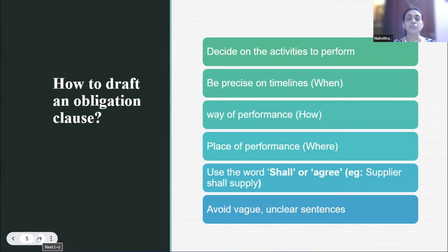In case it is period specific, maybe the person can supply the goods any time between 1st of May to 7th of May. In those 7 days, any point in time, he can go ahead and supply. Here it is period specific. So you can just say within this period, by May 7th, you have to deliver all the goods to my office.